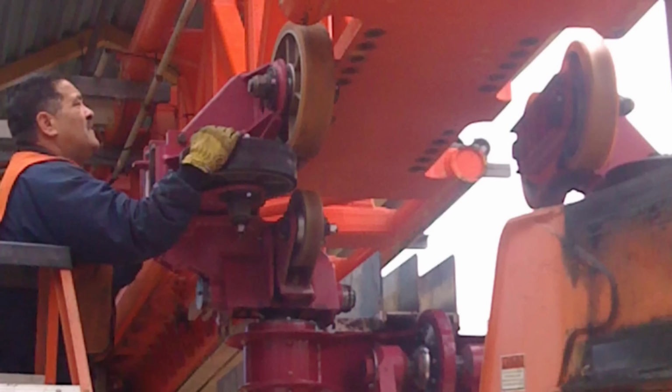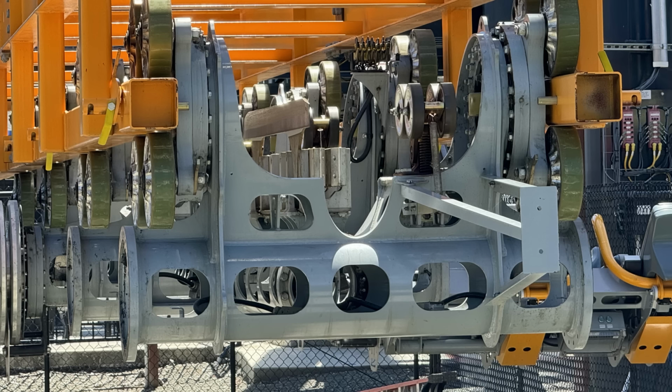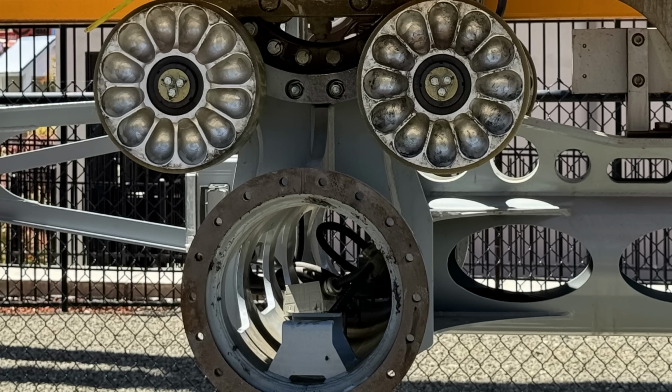So, how does train refurbishment go? I'll give you the big bullet points. It's pretty much the same for everywhere. It doesn't matter the schedule. First thing you do, take them off the track. Check. We got that. Take it back to the shop. Tear it down. Pull everything apart. Get all the parts and pieces apart from each other into big components. Okay, we got all that. What do you do next?